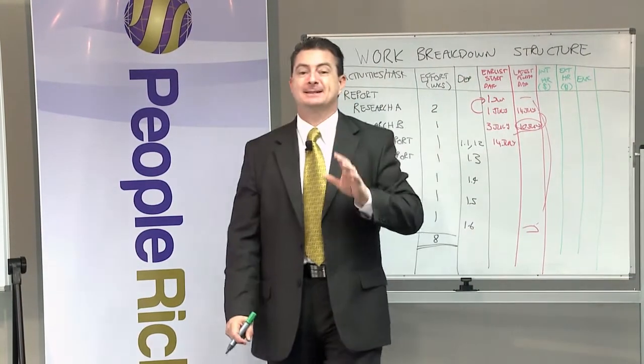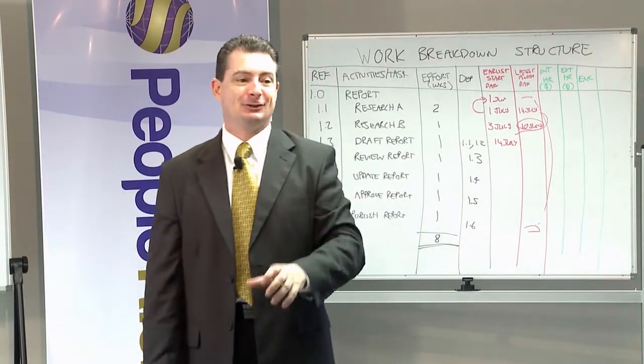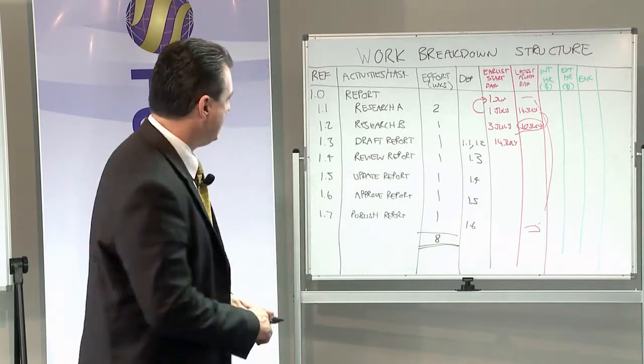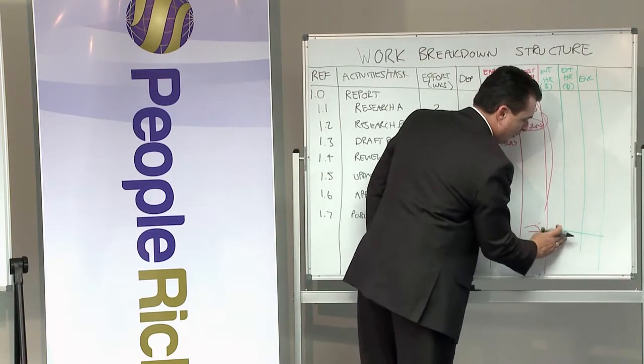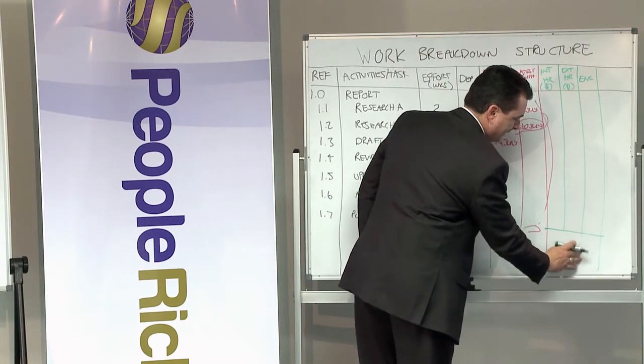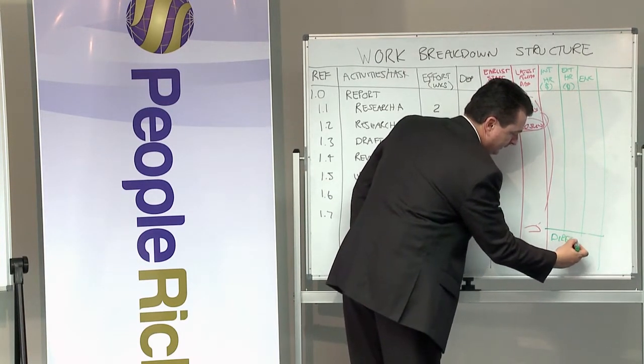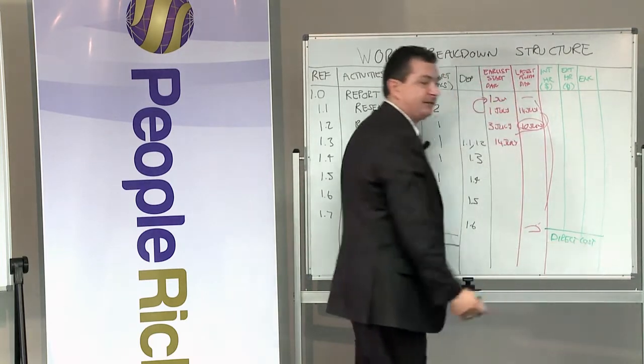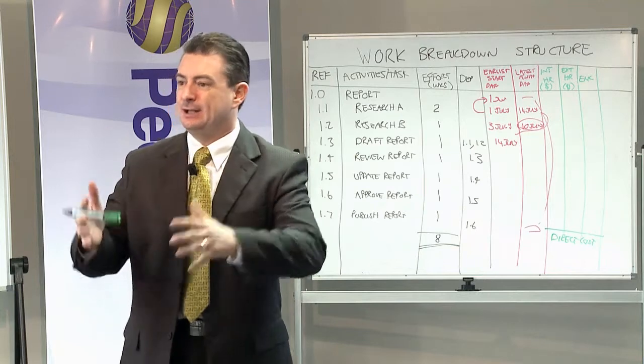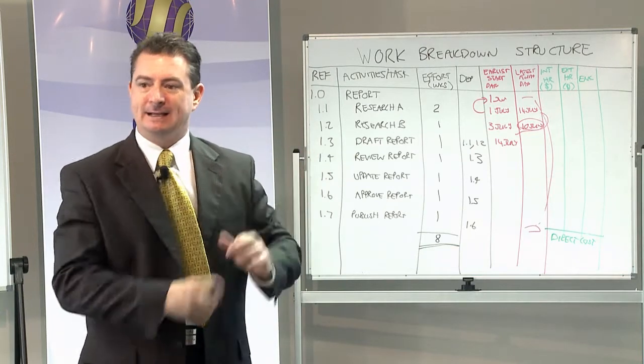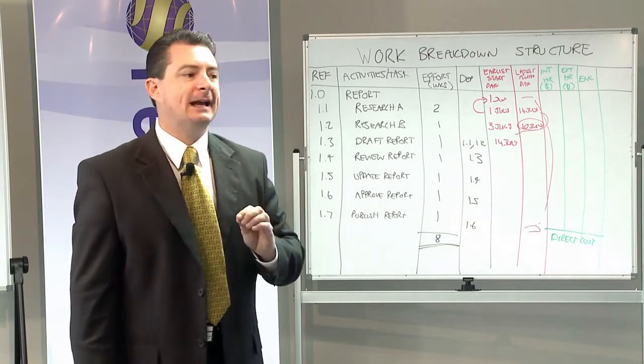If anyone didn't get to write down EMC, it stands for Equipment, Materials, Consumables. Now once I get to the end of adding all these up, we call this in project management our direct cost. So the direct cost is effectively anything that's on the work breakdown structure because I needed it, directly attributing to tasks.